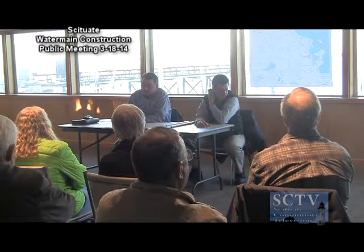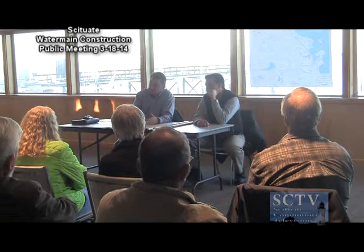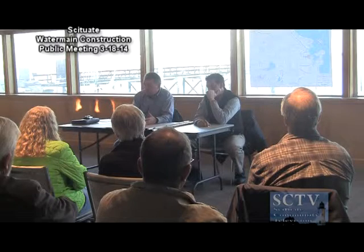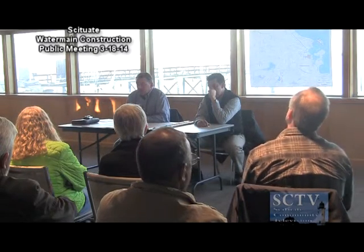During the day maybe, but right, we're not going to close any roads overnight unless this crew's working. But what we will probably do is, in our pre-construction meeting, we thought it was important that the contractor knew that if they start in late April or early May, they should start at Bailey's Causeway and get down as far as they can from there with their main line. I don't know if that helps here. Oh, no, we're just concerned that the road is open to fire and ambulance.